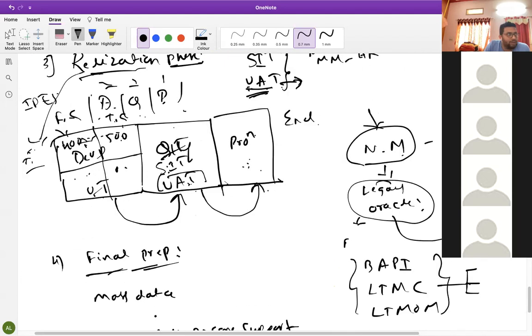Yeah, it's from the end user side only. For us also it is a disadvantage, because we need to work everything again. If they tell us a problem now, we need to go back here. Multiple things will be involved, not just configuration. Any configuration generates a TR number; that number we need to release and transfer the data to here. Doing that multiple times takes more time.